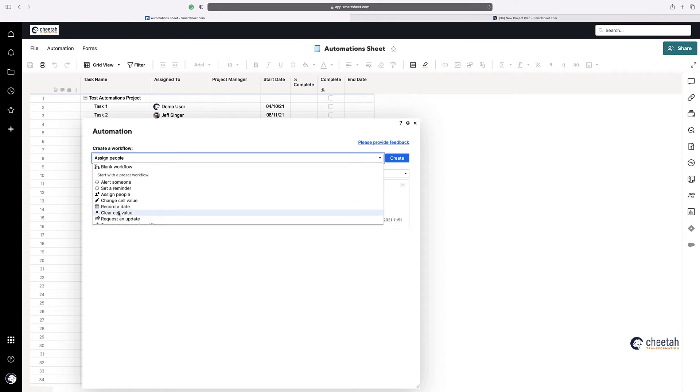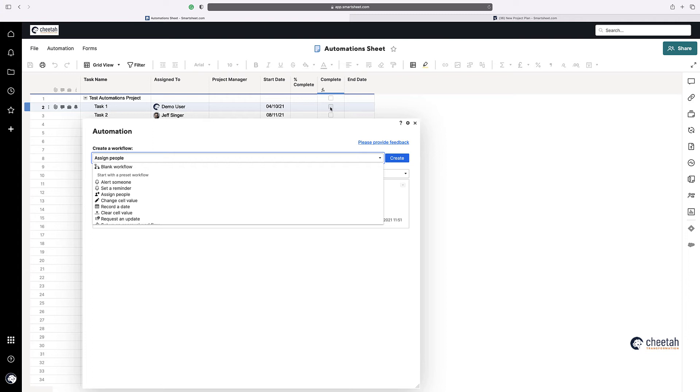Clear a cell is quite handy, actually. So what normally happens is if you record a date, so for example, if something becomes complete, if this is ticked, then record a date. But if someone's ticked that by accident and they untick it, you're going to be left with a date in here. So normally what I do is actually create a record a date, I create a clear cell value as well. Say, record a date if this box is ticked, but if this box is unticked, someone's done it by mistake potentially, then actually clear that value in that cell. So that's something else you can do.